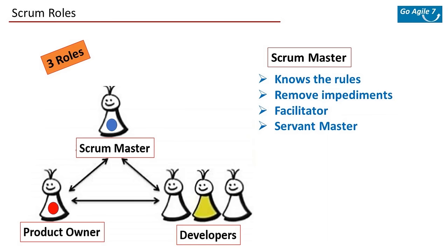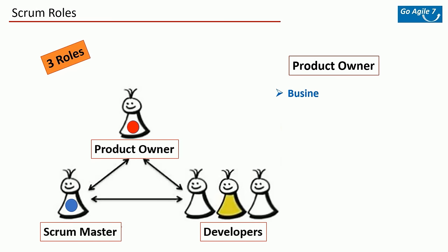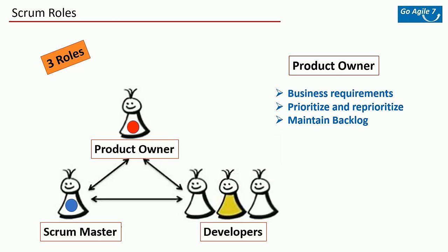The Scrum Master is a servant leader — they work to protect the team, make sure there are no impediments, and that work is moving smoothly. The Scrum Master is only a facilitator; the entire team is responsible. The Product Owner is responsible for gathering all business requirements, coordinating with business stakeholders or product managers, aligning with enterprise-wide business objectives, understanding the business value of each feature, prioritizing requirements, and maintaining the backlog.